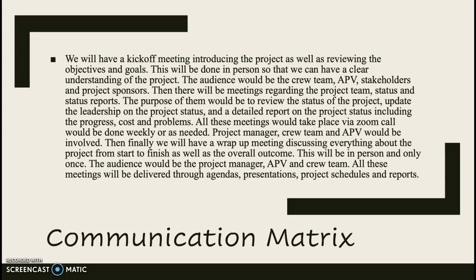Then there will be meetings regarding the project team, status, and status reports. The purpose of them would be to review the status of the project, update the leadership on the project status, and provide a detailed report on the project status, including the progress, costs, and problems. All these meetings will take place via Zoom call, would be done weekly or as needed. The project manager, crew team, and APV will be involved in this aspect of the project.